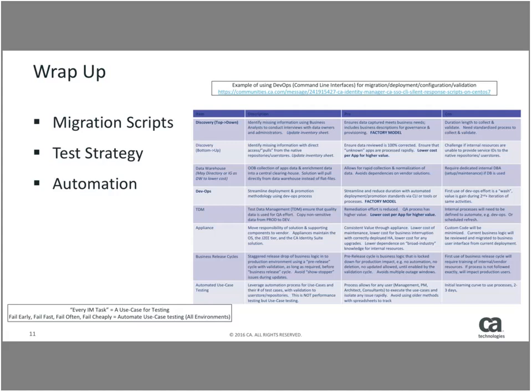And the business team can definitely be, we try to leverage as much as 50% or more of the customer's own staff to do that, because that way the knowledge transfer is there. It's not lost. It's not sent off with the vendor when the vendor moves on. So this is the value of those two areas.